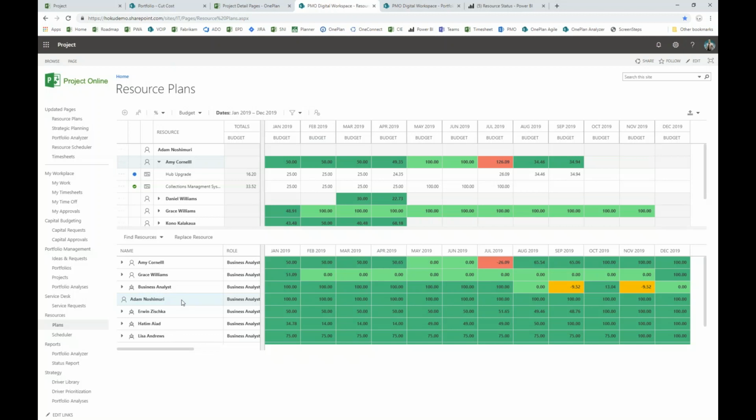So this should look familiar. I did this as a project manager, substituting a generic resource with a human resource for my team. But if your process in your organization doesn't support that, and many organizations do that, where they allow project managers to plan with largely generics and or only assign resources that work for them on their particular team, the resource manager in turn could substitute and replace that resource appropriately.